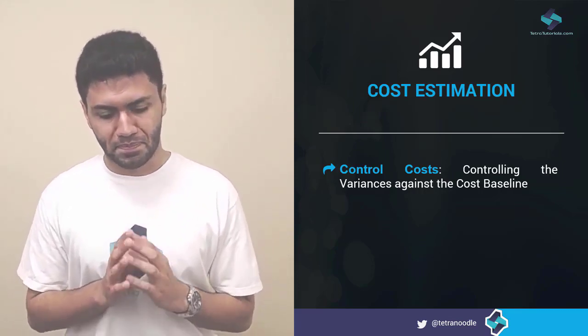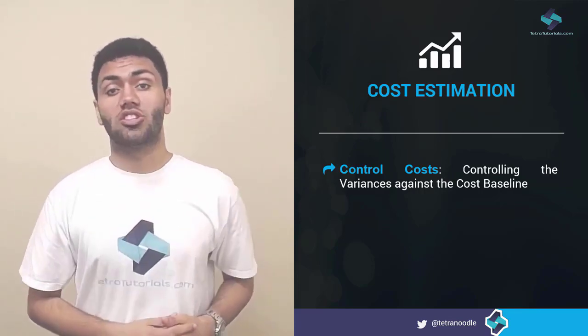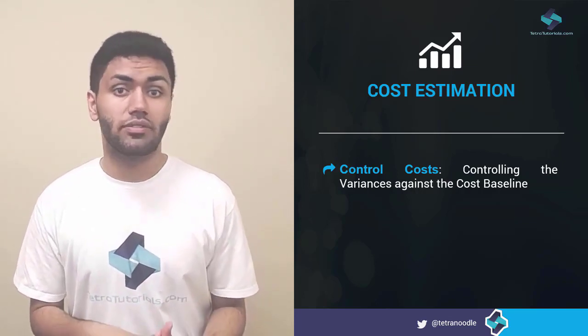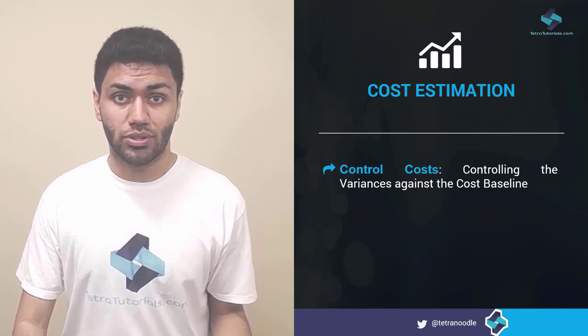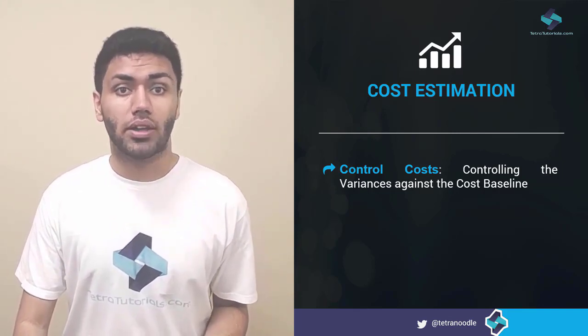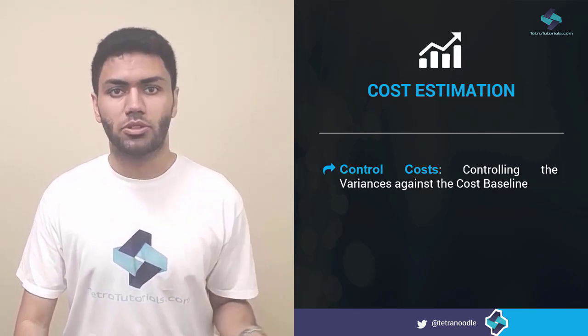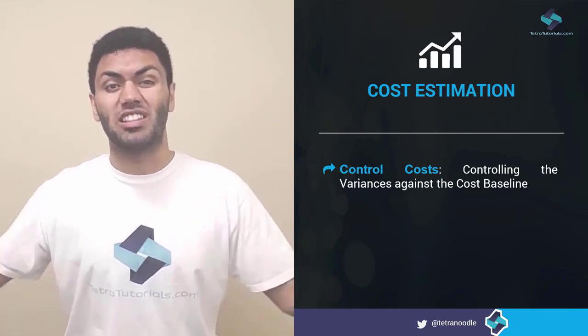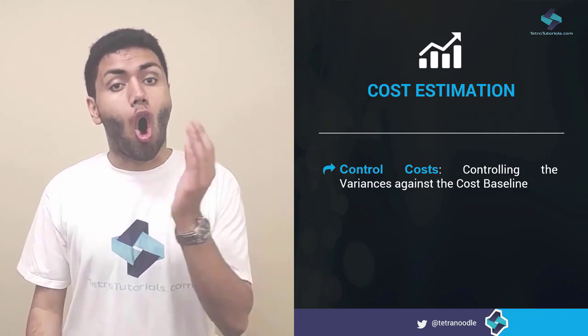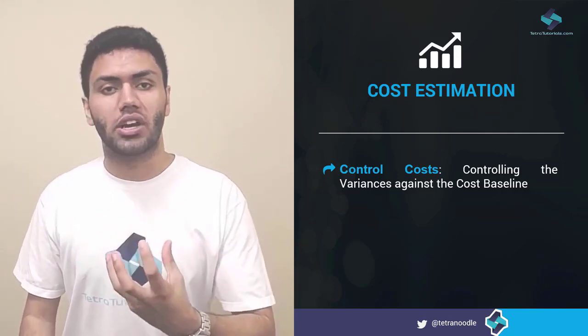For instance, you may split the cost of some resources with other teams or even other organizations. You may opt to use outsourced resources for completion of the project while keeping the costs low. You may opt to use open source free software instead of enterprise grade expensive software. All these measures are part of cost control.